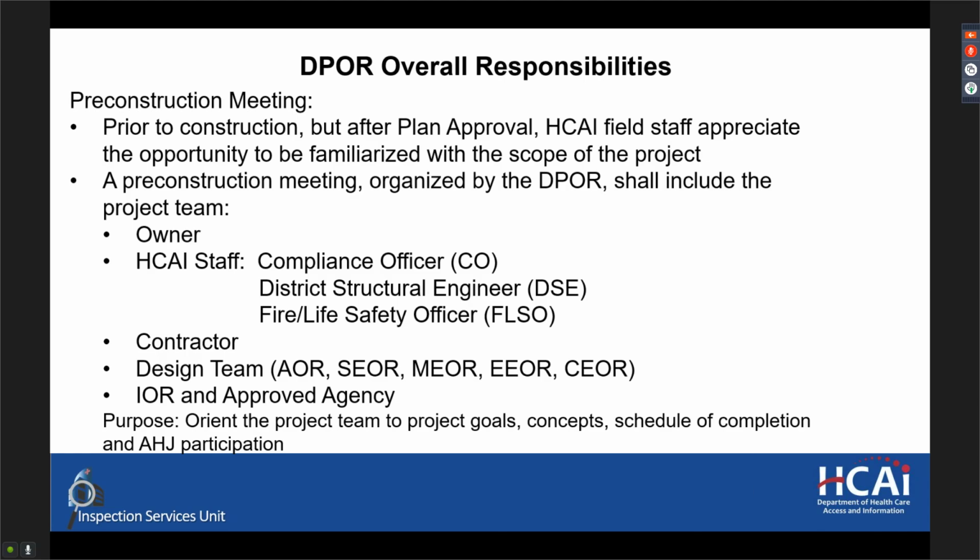Prior to construction and after plan approval, we definitely appreciate the opportunity to be familiarized with the scope of the project. The DPOR should be the individual or entity organizing a pre-construction meeting, and the pre-construction meeting shall include the project team, which is an owner representative, HCI field staff, so that would be a compliance officer, a district structural engineer, and a fire life safety officer that's already assigned to your facility.